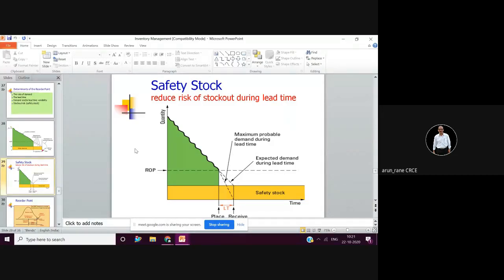In this period, companies are sometimes closed for 7 days or 10 days, and even around New Year, 7 days before and 7 days after, that is 15 days. You will not get anything.